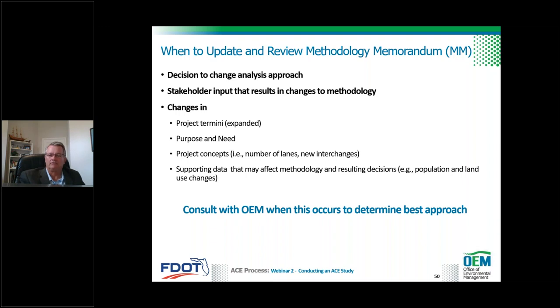So whatever the reason is, changing a methodology memorandum is not something that you just do on the side. It requires a process. This is a process change, and it requires coordination with the ETAT. So in this case, a consult with OEM is really a good thing to think about, because they might have some lessons learned from others as well. Next slide.